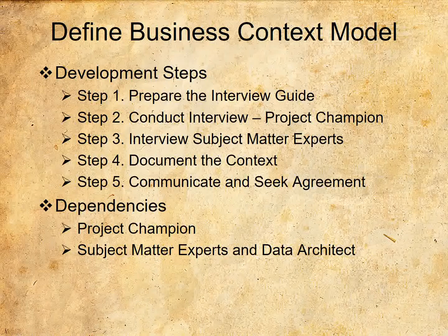Conduct the interview with the project champion. Since much of the data required for the context diagram can be collected in a well-executed interview with the project champion, it is important to plan data collection for this purpose into the interview. During the interview, ask questions that pertain to the context diagram. Collect the information. If possible, sketch the context diagram for discussion and clarification. Whenever the project champion is uncertain of the answer, or simply does not know, be sure to ask for the name of subject matter experts that you can interview to get the answer.